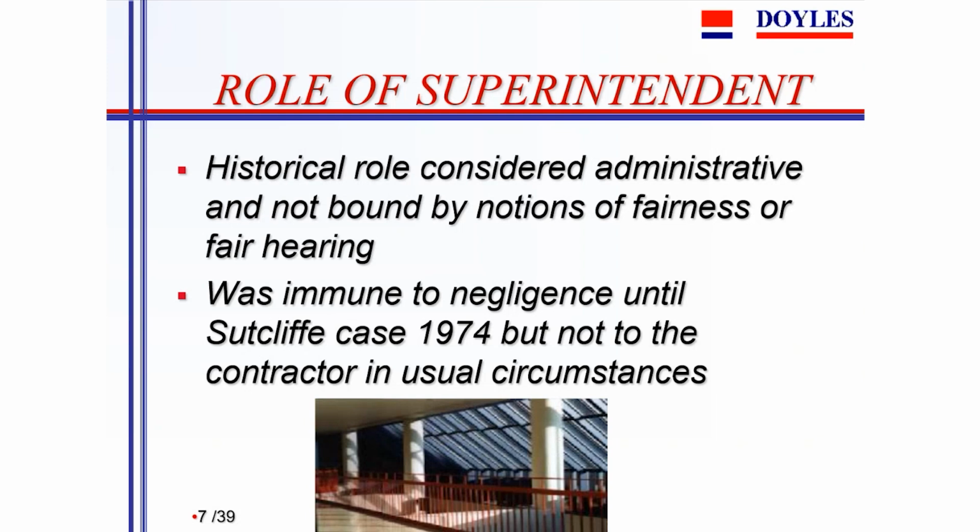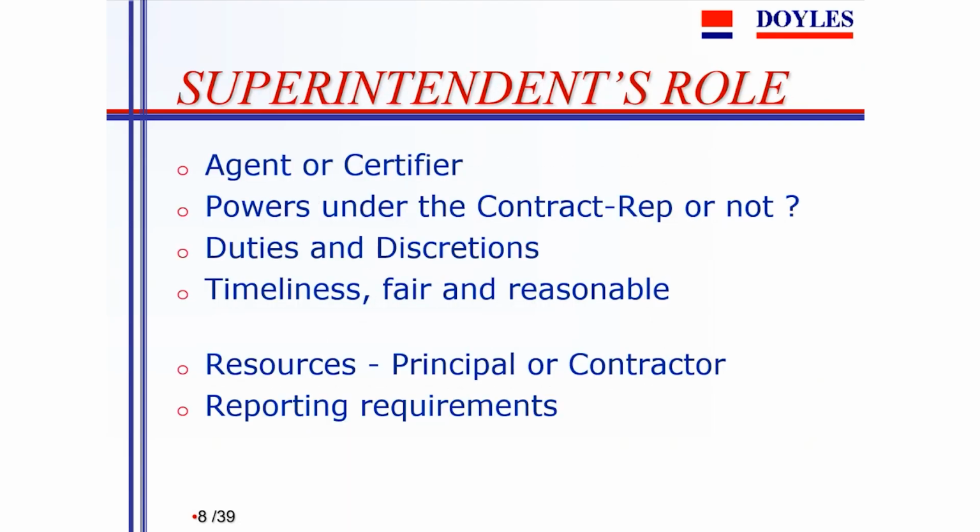These days, however, the role of the superintendent is changing. Principals are adopting less generous provisions for a superintendent, and they're providing that he's an agent, he's not a certifier. That is, they're providing that he is doing what he's told, not doing what he thinks is right. And there's an important distinction. And that's made a lot of contracts more hard-edged on the contractor than previously.